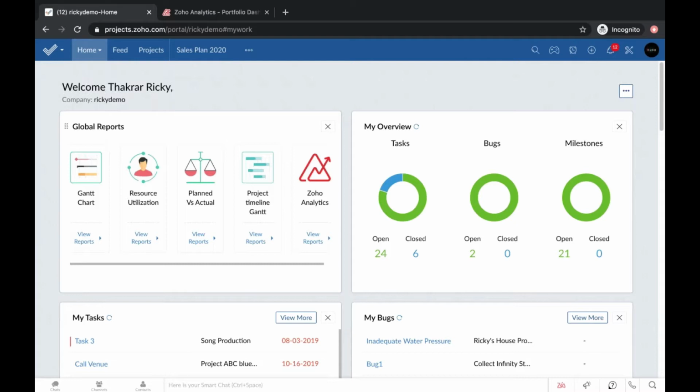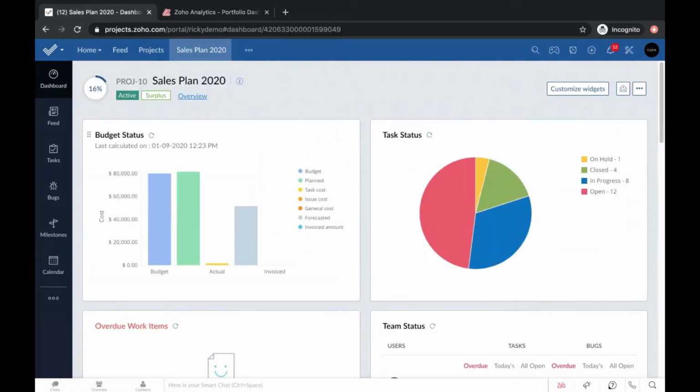Okay, so again, this webinar is gonna focus on the reporting and analytics, but for those of you who are not used to using Zoho Projects just yet, I want to make sure that you understand the general outline of the application. So project management is built all around a list of tasks. Those tasks are all placed in subcategories. A large overarching task is considered a milestone. Then you can break those tasks into task lists, and then you have different to-do items, which we call tasks and subtasks. And then those can be linked together so that the tasks can be dependent on each other, right? Task 1 must be completed before task 2 can start, or task 1 has to start before task 2 can start, or these different dependencies we'll go over today: finish to start, start to finish, finish to finish, and I'll talk more about that.